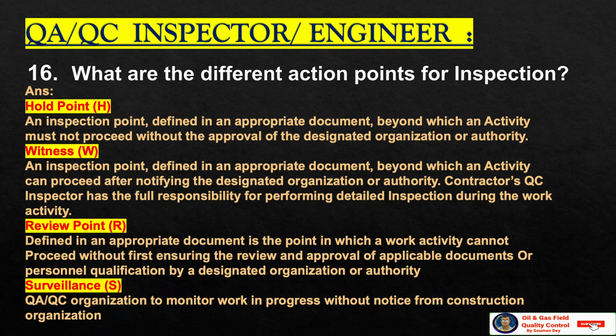Hold point is an inspection point defined in an appropriate document beyond which an activity must not proceed without the approval of the designated organization or authority. Witness is an inspection point defined in an appropriate document beyond which an activity can proceed after notifying the designated organization or authority. Contractor QC inspector has the full responsibility for performing detailed inspection during the work activity. Notification to the client is mandatory.